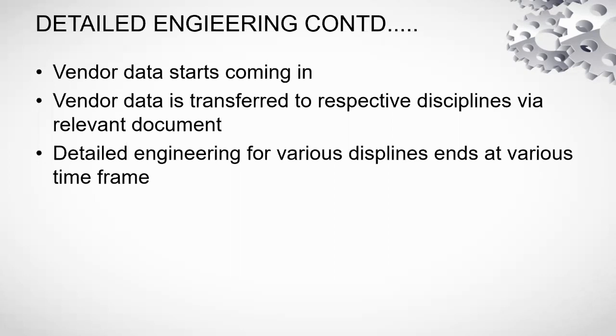Civil also ends at a very late stage. Civil is a department which I must say is responsible for major construction-related drawings. And the irony is that they receive the data at a very late stage from the mechanical and piping disciplines, because they are expected to receive data from vendors. Civil receives this confirmed data at a very late stage, and unfortunately they are expected to give documents which are required on the very first day at site. So this is kind of a bottleneck for civil engineers, I would say.